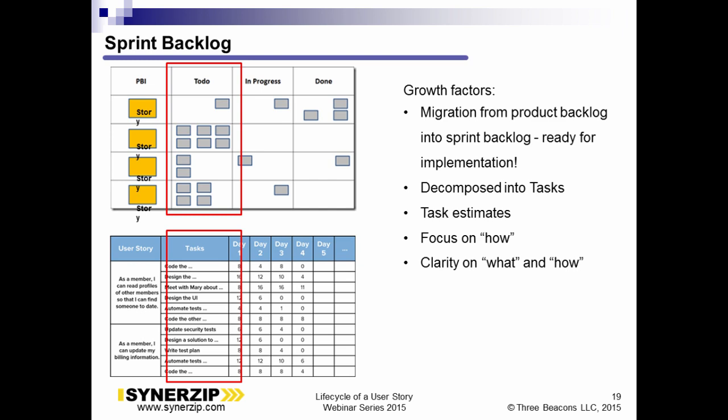We talked about the breakdown of tasks and that it's a significant growth factor. Going back to the start trip story, here are some potential tasks: set trip timer, design a trip database record, calculate the distance, and others. These also contribute to the growth of the story from an implementation perspective. So we've gone through conception, birth, and growth. Now let's talk about maturity.